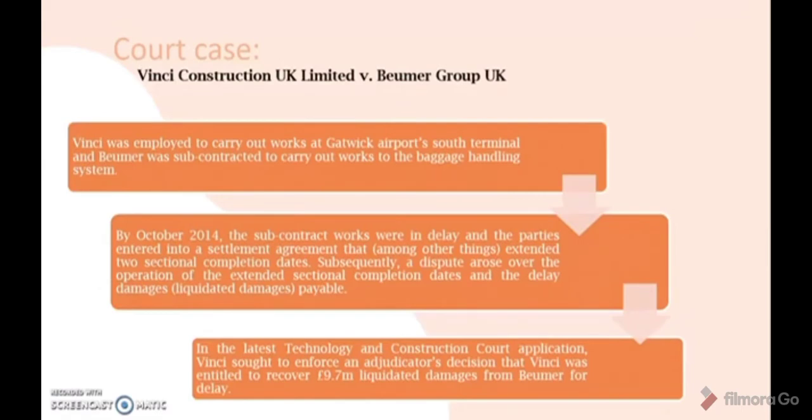So the court case for sectional completion is the case of Vinci Construction UK Limited versus Bumer Group UK. Basically, in this case, Vinci was employed to carry out works at Gatwick Airport South Terminal and Bumer was subcontracted to carry out works to the baggage handling system. By October 2014, the subcontract works were in delay and the parties entered into a settlement agreement that extended 2 sectional completion dates. Subsequently, a dispute arose over the operation of the extended sectional completion dates and the liquidated damages